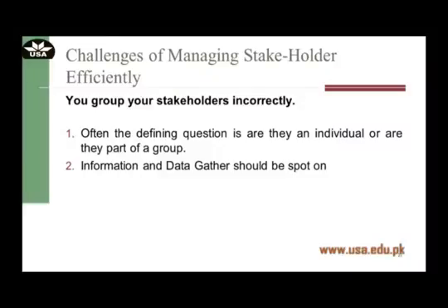That is why it is very important that whenever you are going to communicate with a certain person, you identify what group or what particular community he belongs to. For example, if you are going to start a construction project in a certain community, your neighbors, the people living around you, are individuals, but they are also part of a huge community. If, as a community, they collectively become resistant to your construction project, you would never be able to complete your project on time, or you would require some strategies in order to complete it. You cannot simply ignore these individuals if they are part of a certain larger group.